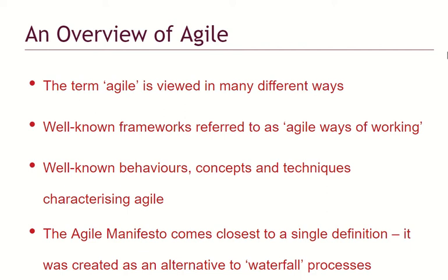For example, after building the carcass, maybe the roof was initially supposed to be this latest roof, but the funds are not available. Then the owner of the property can change course and say, okay, I can't afford that, which we thought we were going to do in the second phase. Let's change. That is very easy to do with Agile. With Waterfall, it's a bit difficult.